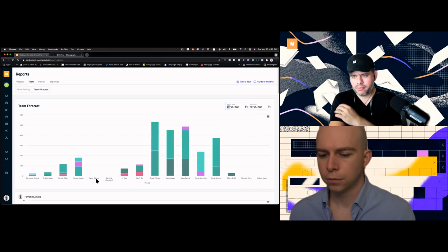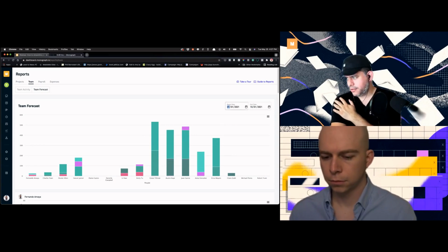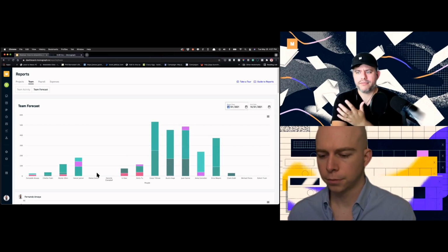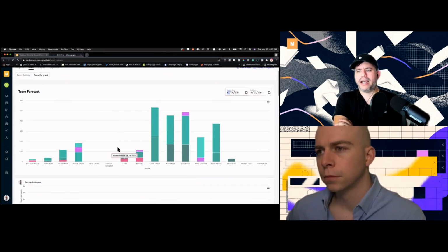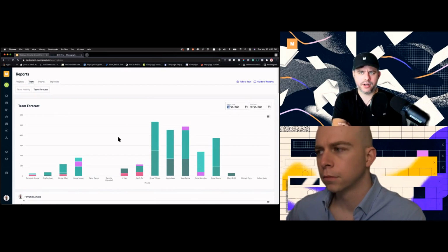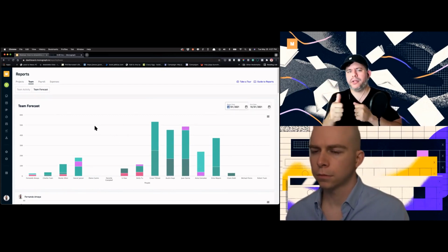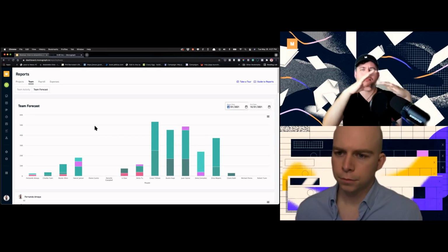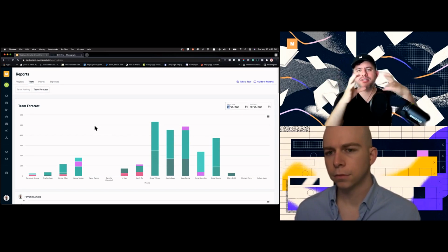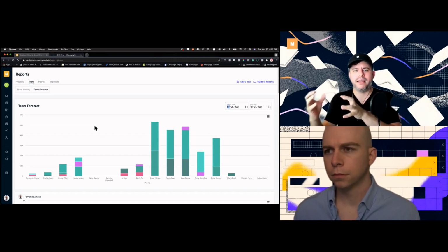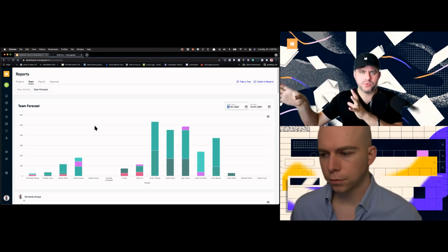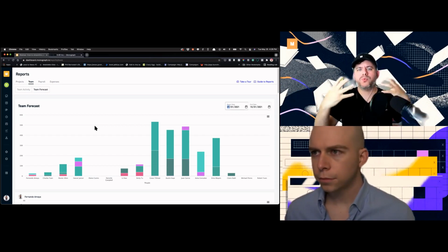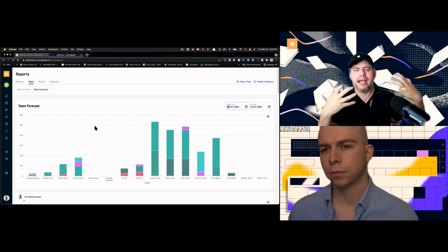Okay, I have new team members that just started with us, 4 of them here, that look like they have some room. I'll reallocate some of these hours across other team members that might be available, but at least I have some sense that there's some bandwidth for some people within that time period where they're not working on projects. So that, plus looking at the projects that are upcoming, knowing the quantity of projects, gives me some indication of who might be available to work on that. Obviously, you can then look at this for other purposes as well, because it is a broader forecasting tool. But I just wanted to let you know that there are different places where you can gather this information.